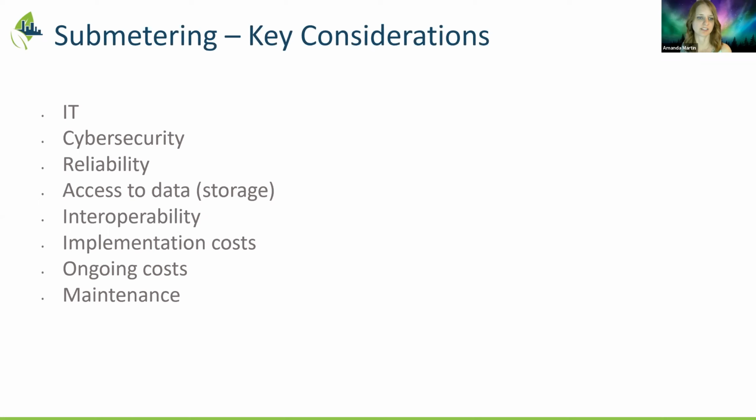And the last bit of advice I would say is engage IT as early as possible. When you know you need a meter is a good starting point, because sometimes they need quite a bit of lead time. There could be extra security assessments. They could have staffing shortages. So it's good to engage them early and help pinpoint where the locations are going to be, how many meters we're going to need, so we can run the cables and make sure we have the data available before, or at least when we need it.